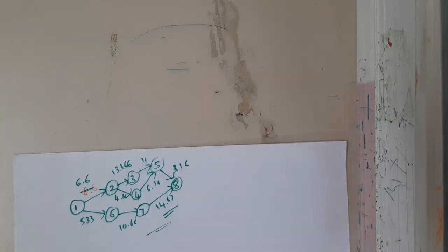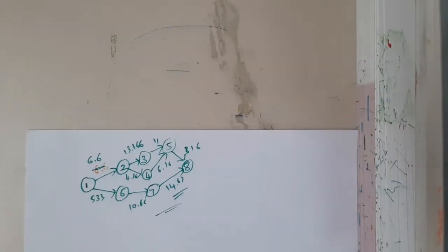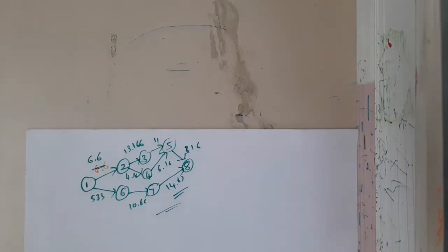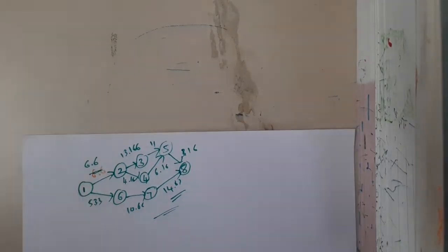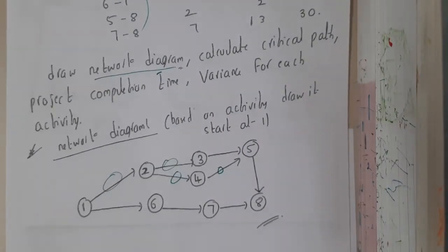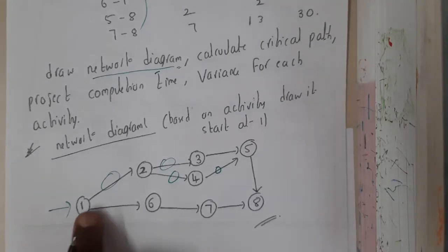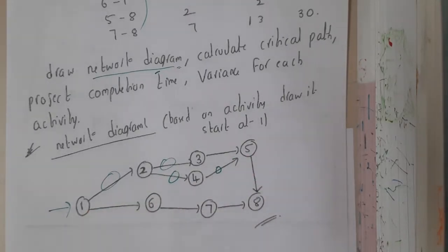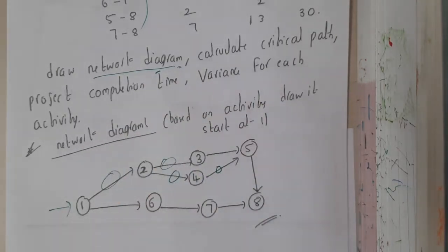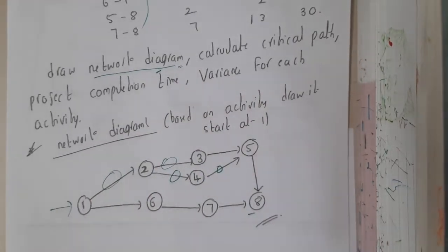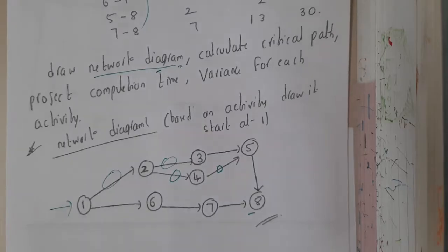diagram, guys. Once the updation is done, you already know where you are starting and where you are ending, right? You might be having a question, how did you know? Just by observing the diagram you can say where the starting point is. This is the starting point, because if you start here you can reach every point. Similarly, where is the ending point? Wherever you start, you are going to end at 8, so that is the ending point. In this way you can identify, guys.